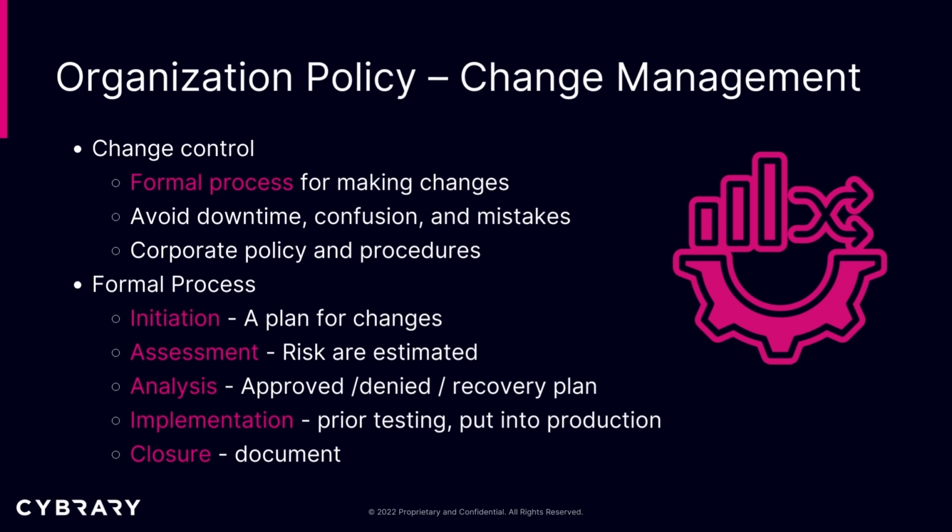Now, this process could involve a change control board if the organization is large enough. Participants of this board would include a representative or a key person from each department or key stakeholders of the organization, like the IT department. Now, the process steps for this process include the initiation, the assessment, the analysis, implementation, and the closure.